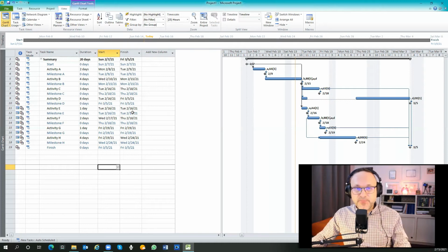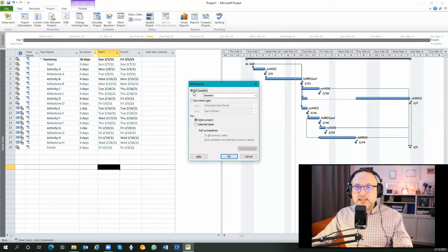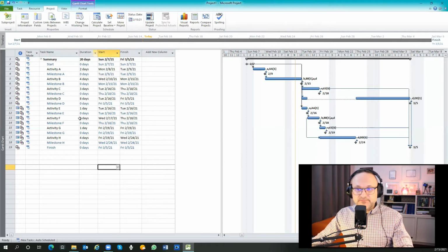We said in the episode of defining the 6 steps and creating the project schedule that you work only with the approved version of the schedule. The approved version is the schedule baseline. That means I need to make a baseline here to make it ready. So let's make a baseline. I will set my baseline, set baseline for entire project. Okay, the project is baselined now.